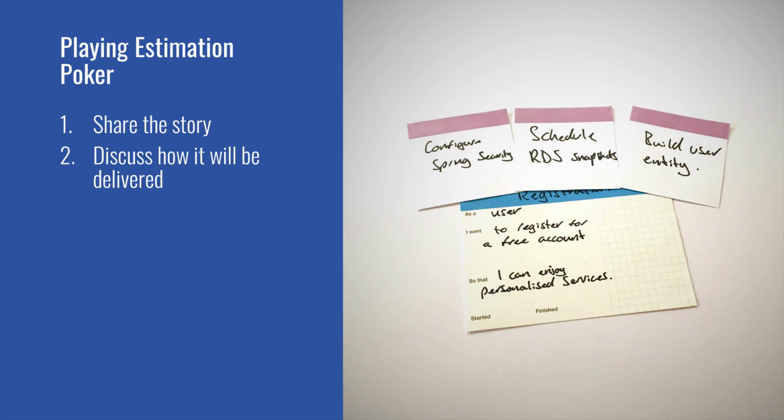The selection is anchored by a few points of objective information. The simplest imaginable user story is always worth 1 point. Also, from the second estimated story onwards, which means after no more than 30 minutes, players will be able to recall what points they gave to other stories and can choose a number relative to those stories. The relationship between these estimates of complexity and units of time comes later. Notice that time is not used during the game at all.